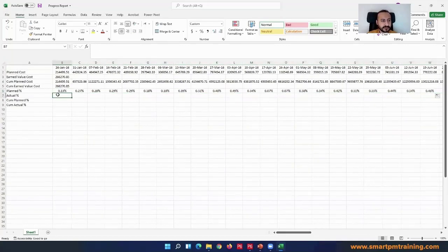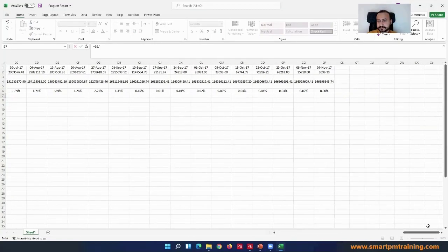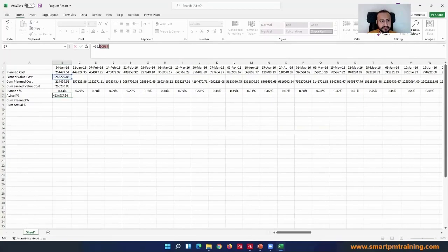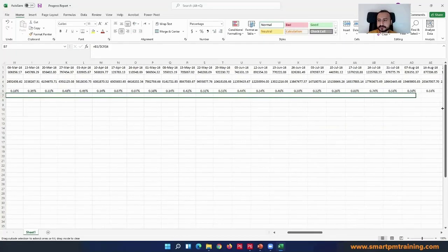Okay, let's do the actual. I'm gonna take the earned value cost divided by total contract value, F4. Okay. So that's my actual.